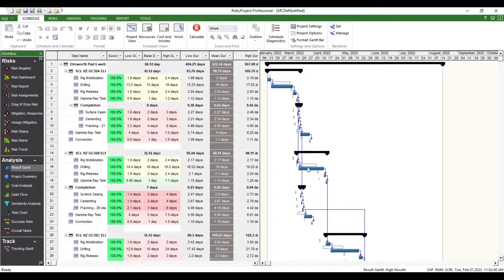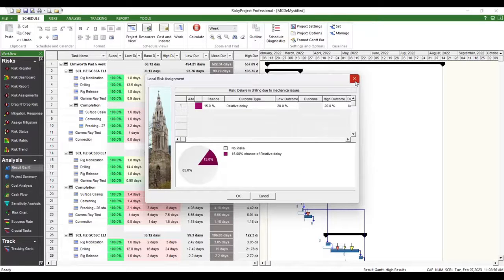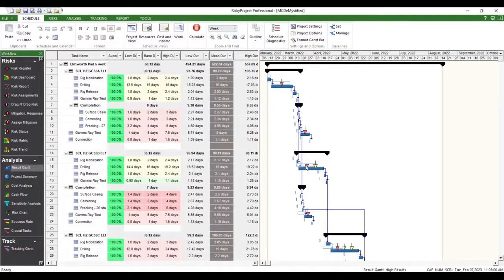It's taking with risk, no risk, and deterministic with risks and uncertainties. If you wanted to show where the risks are occurring, you can click on one of those, and these risks are color-coded to indicate criticality or ranking in the system. If they're down, they're threats, and if they're up, they'd be considered opportunities.